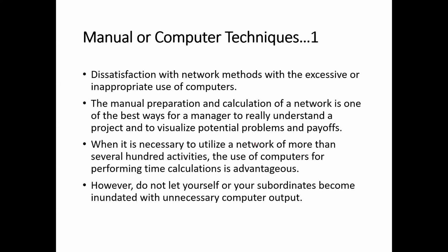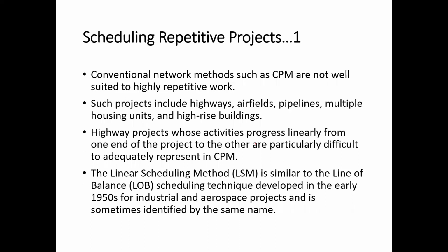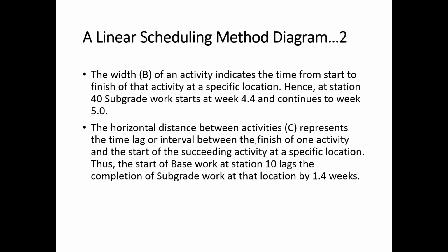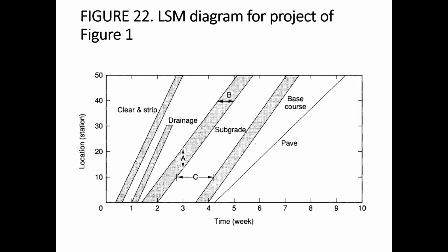Okay, so for scheduling repetitive projects, there is a technique called the linear scheduling method. The linear scheduling method is a very useful technique for highway projects, and sometimes also for building projects, especially for the structural part of a multi-story building.